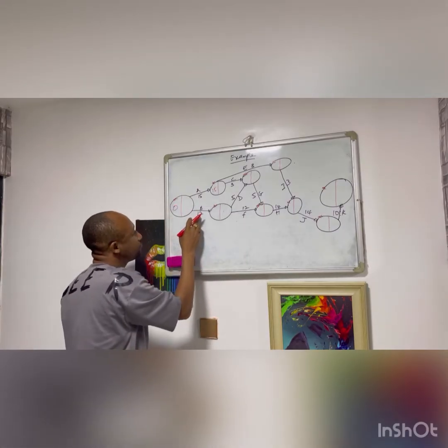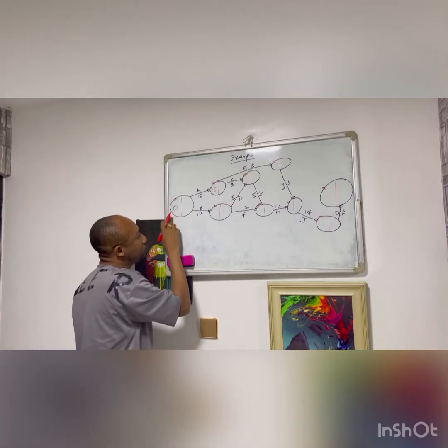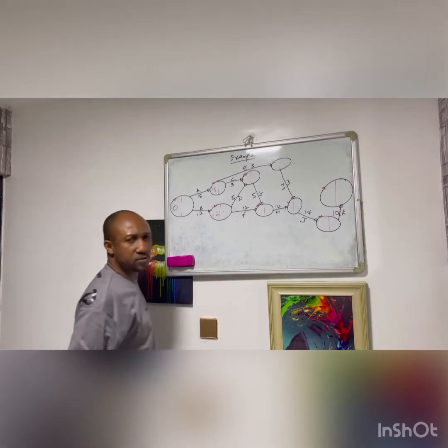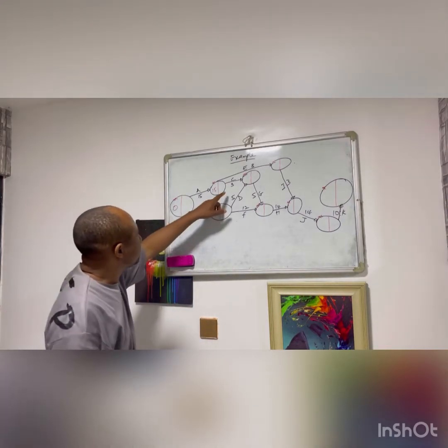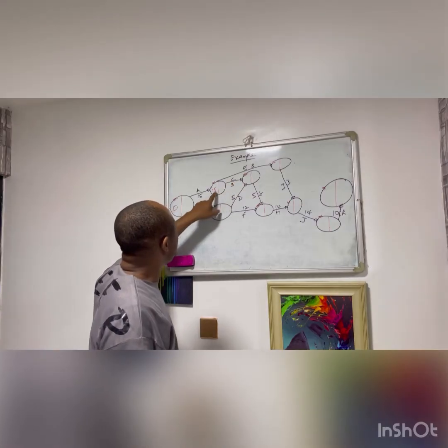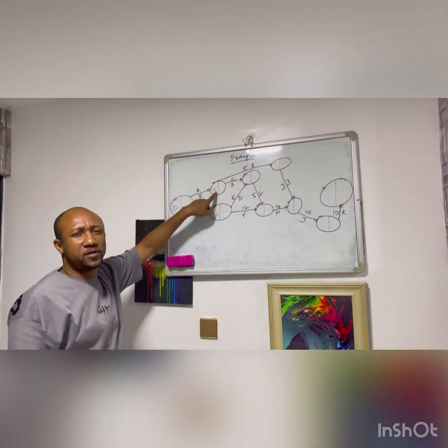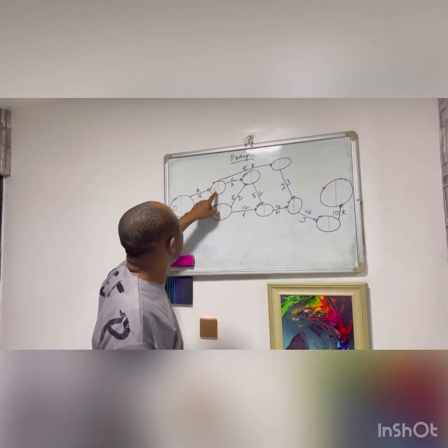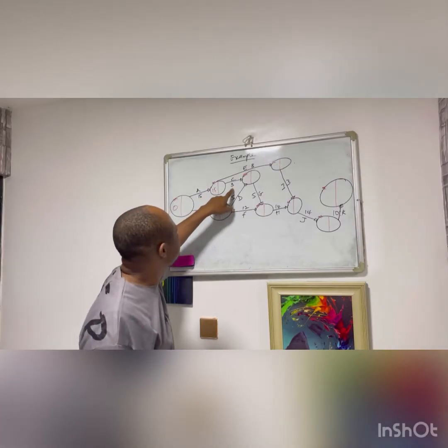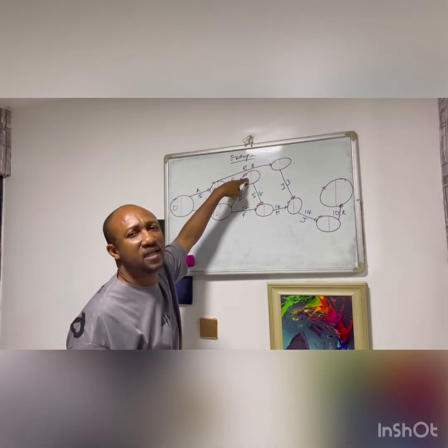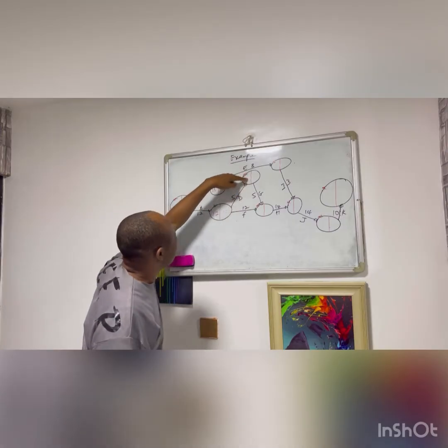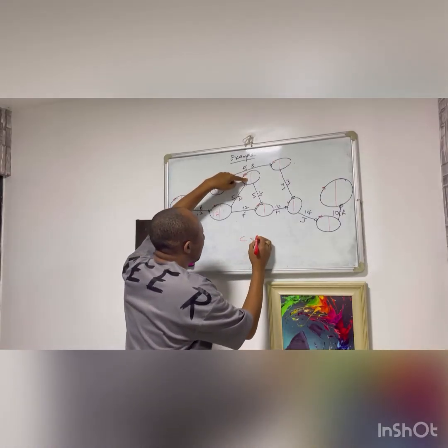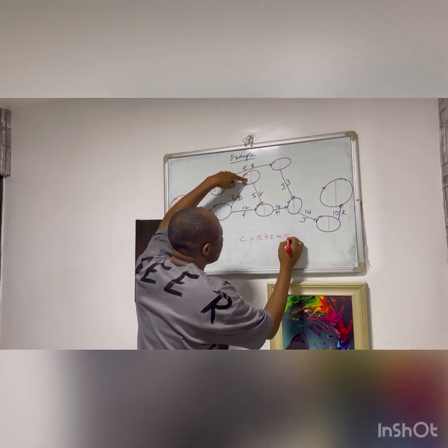Then the same thing for activity B, which will commence at week 0 and use 12 weeks. By the time activity B is arriving here, it's already 12 weeks. Now activity C will take off in week 15 and use 3 weeks. If activity C commences in week 15 and uses 3 weeks, by the time it is arriving here, it is already 18 weeks. And like I said, I noticed that it is not only activity C that is arriving here. So for activity C, I have 15 plus 3, which is 18.